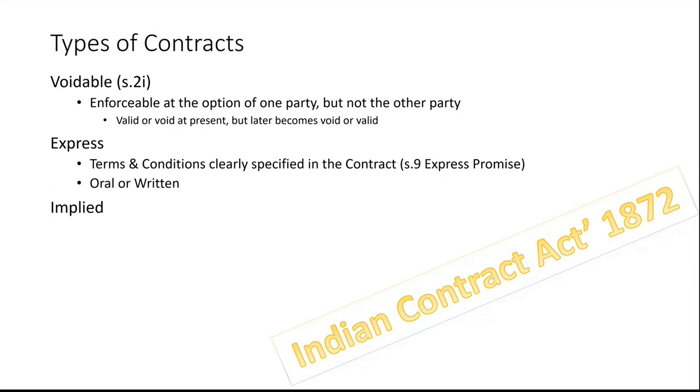You have to tell me from construction. I don't think so. Because in our case, change in law is a ground mentioned in extra cost, extra time. So for us, it gives a provision. It doesn't make the contract voidable. Had it not been mentioned, it would have made it voidable. We would have said, no, this is the condition. And that we will cover in frustration also.